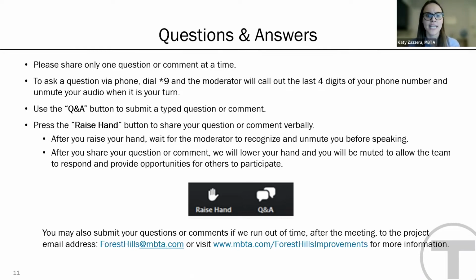An anonymous attendee, how will the revamping of the station affect service? Well, appreciate the question. All the construction will be phased to minimize any impact to customers and ridership. We're looking at quite an extensive amount of work inside the station, including elevators and elevator updates. So work would be sequenced to maintain some level of elevator to each location, be phased. There'd be some night work that would take place and off hours work. But the goal would be to minimize impact to the customers. And really that would take place through phased construction.